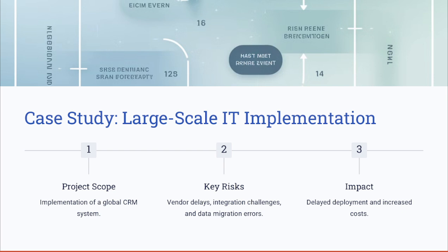To start with this case study, let's say we have the project scope of a multinational corporation which aimed at implementing a global CRM system to unify the customer data and streamline the operations. The key risks were identified and emerged during the planning phase, such as vendor delays due to resource shortages, technical challenges in integrating with legacy systems, as well as errors in migrating large data sets.